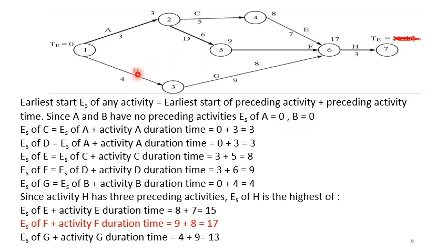Next, you have to see the earliest start of C. Now the earliest start of C will be, just look at its preceding activity. What is the preceding activity of C? That is A.